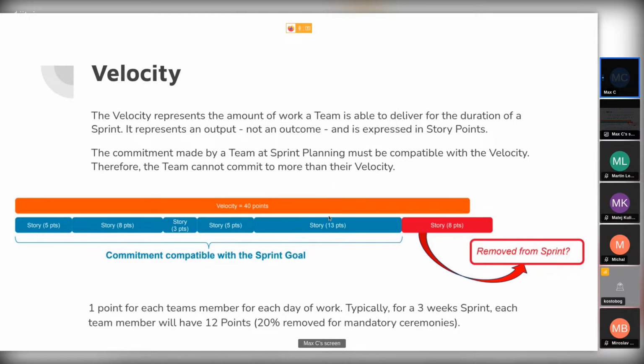And then for each user story, you give a number of points that you calculate depending on how big you think the task will be. And then you can set up in your sprint how much you will be able to do during this sprint. And that's basically the goal of it, to really force you to have these goals and these stories to follow.